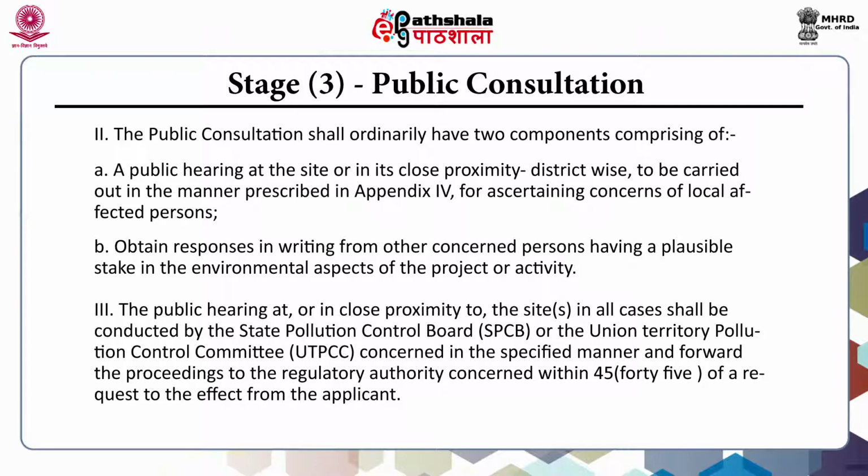The public hearing at or in close proximity to the site in all cases shall be conducted by the State Pollution Control Board or the Union Territory Pollution Control Committee concerned in the specified manner, and it shall forward the proceedings to the regulatory authority concerned within 45 days of a request to the effect from the applicant.